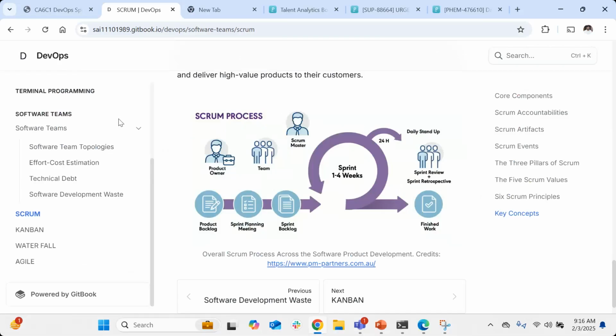If you look at this image, the Scrum team, the product manager sits with the team and does the grooming. So you'll basically plan the sprint, how the sprint should be, how much effort you need, what is the time you need, what tools you need, are there any dependencies with other teams. All those items are discussed and brought into the sprint. Here it's showing 1 to 4 weeks, but typically a sprint is like 2 weeks.